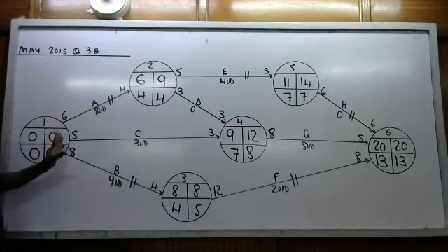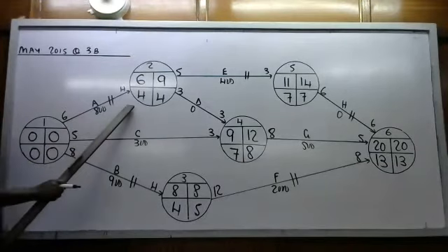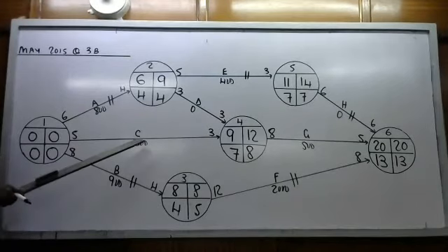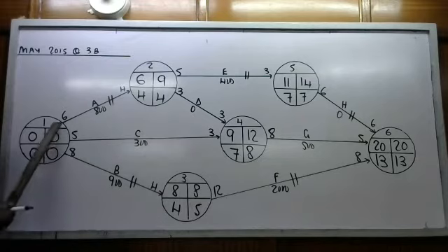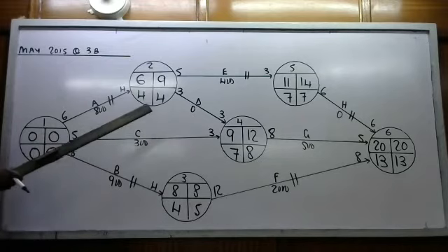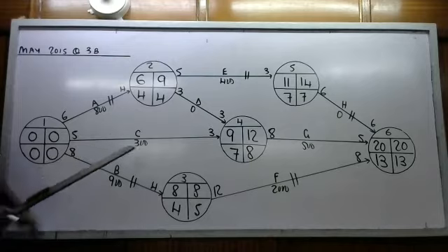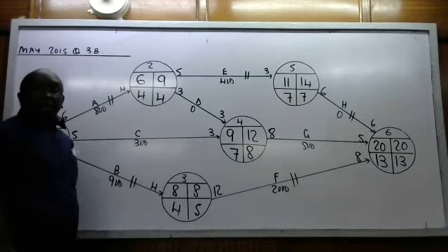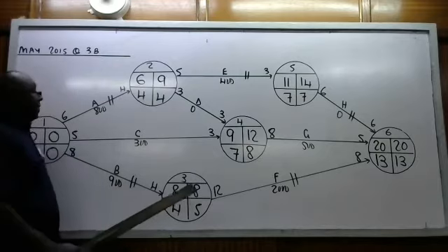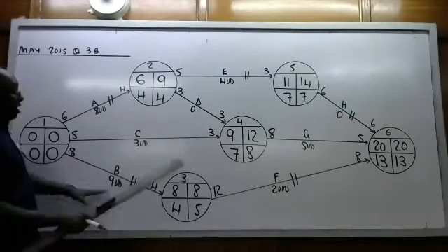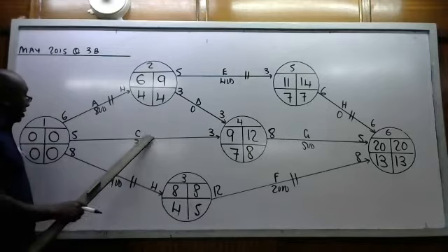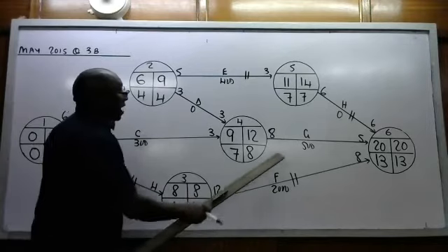I told you, you come here and assume there are 2 persons. One follows the critical part, the other one follows the non-critical, and everyone maintains their part. So the earliest these guys will meet when the part is number 1 will be number 6. So we have all these activities down here that we need to uncrash. Is that okay? So if we have all these, that means our candidates of uncrashing are C, B, F, and G.